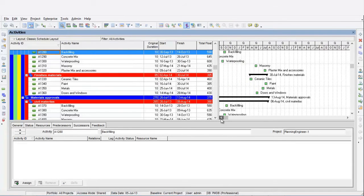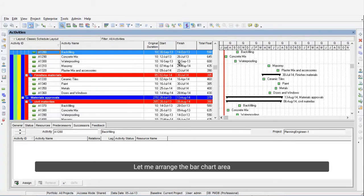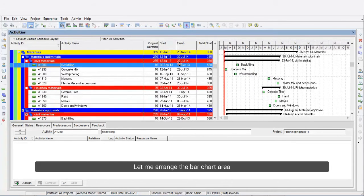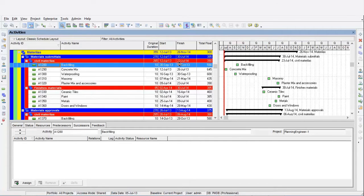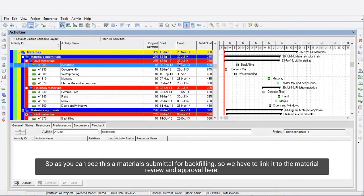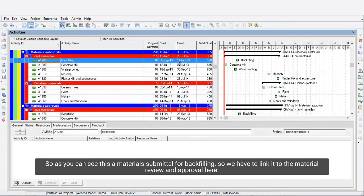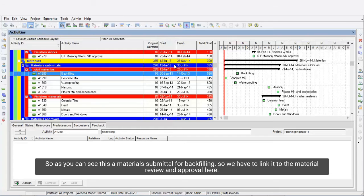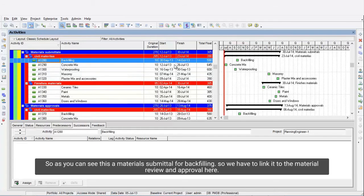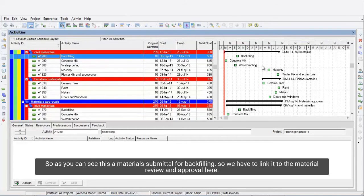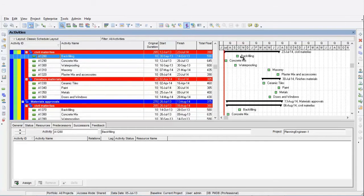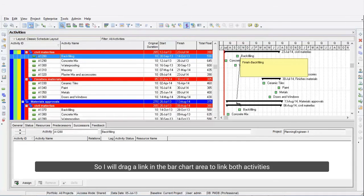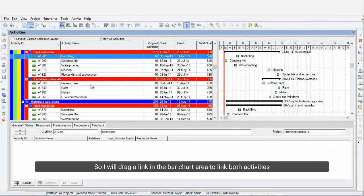Let me arrange the bar chart area. As you can see, this is materials submittal for backfilling. We have to link it to the material review and approval here. I will drag a link in the bar chart area to link both activities.